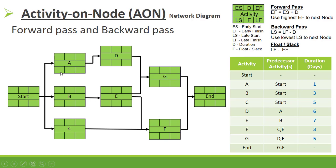Creating the network diagram: activities A, B, and C are connected to Start. Activity A is connected to D and to E. Activity B is connected to E. Activities C and E are connected to F. Activities D and E are connected to G. Activities G and F are connected to the Finish node.